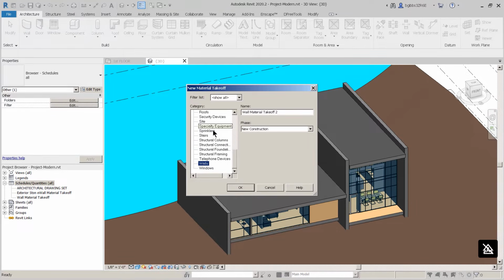and what we're going to do is use a unit cost for each of the walls, and I'll show you how we'll get that. But if you look up here, you can also see things like furniture and different types of casework, which are things that you could do one by one. For instance, if you had 2 cabinets, they might cost the same.